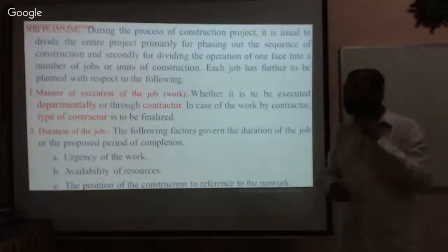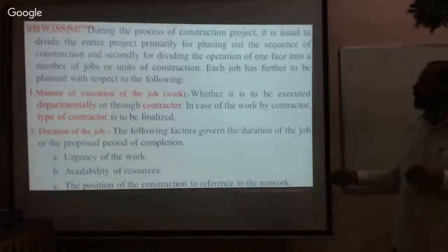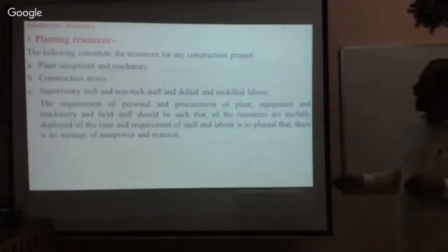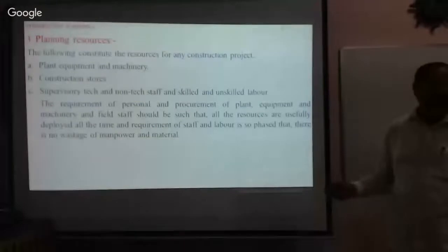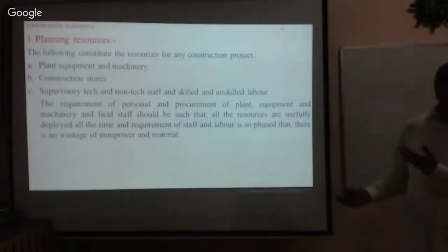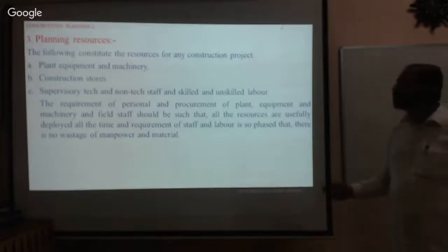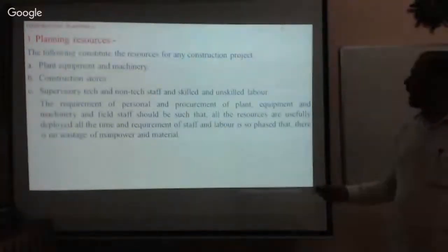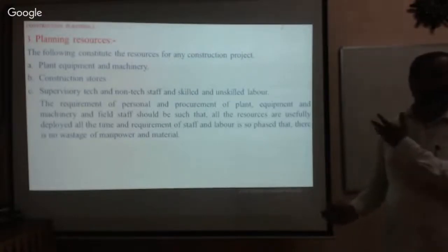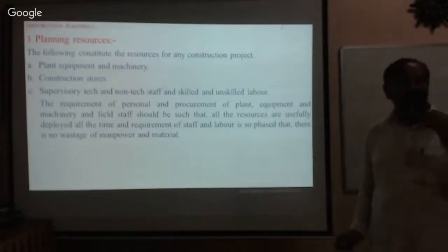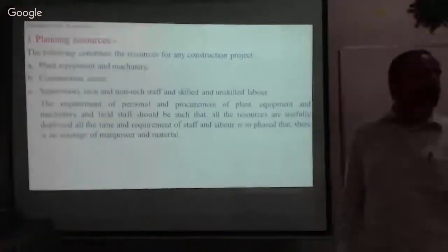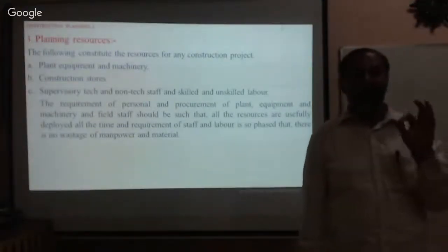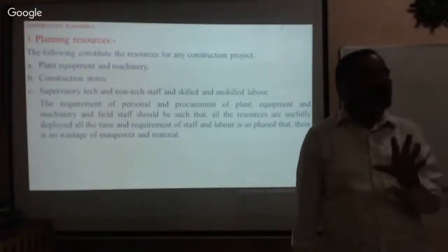Before that, I will discuss one more technical term, which is planning resources. Before commencement of any project, this includes plant, equipment and machinery, which is at job level. We have gone through that. All those things should be carefully planned. Then the construction store, supervisory and technical appointment of engineers for a bigger project. You need to appoint the staff, that is engineering staff and administrative staff.